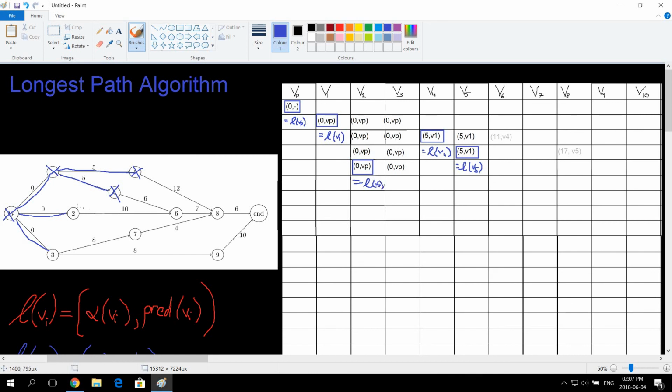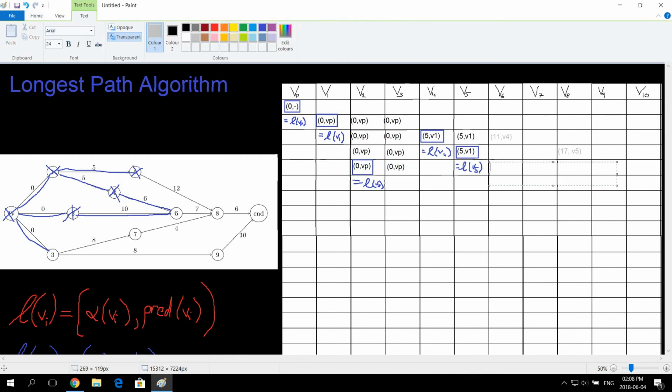So now we can cross this one off, and look here. Now both the predecessing vertices going to V6 have been explored. So now we can weigh them up. So what I'm going to do is here, where I blocked it, I'm going to draw. Now you guys will be able to see why I do it where the block is. I'm going to write 10 because it costs 10 to get from V1 to V2 to V6.